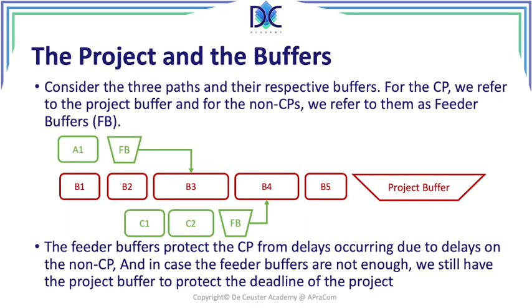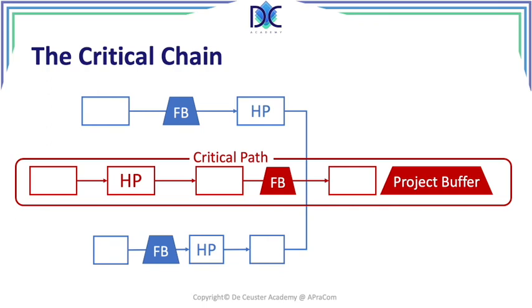The advantage of reducing the durations to their 50% estimate and having the project buffers gives us a better way to deal with the project. The Parkinson law is limited to a reduced duration if we finish earlier. The student syndrome is happening faster because we have to finish it. All the advantages here bring us the possibilities to finish the project earlier. Based on this, we can also identify the critical chain.